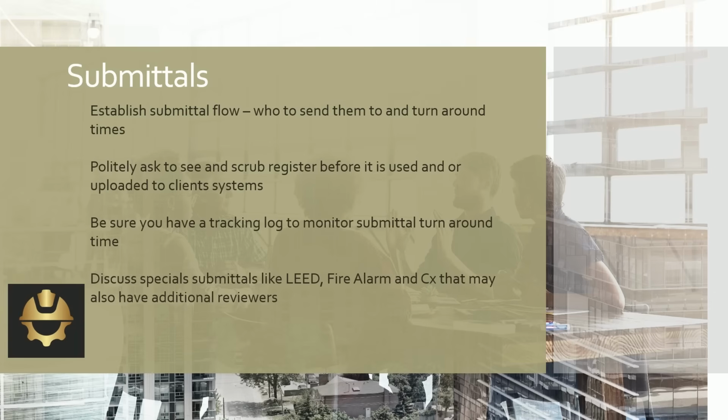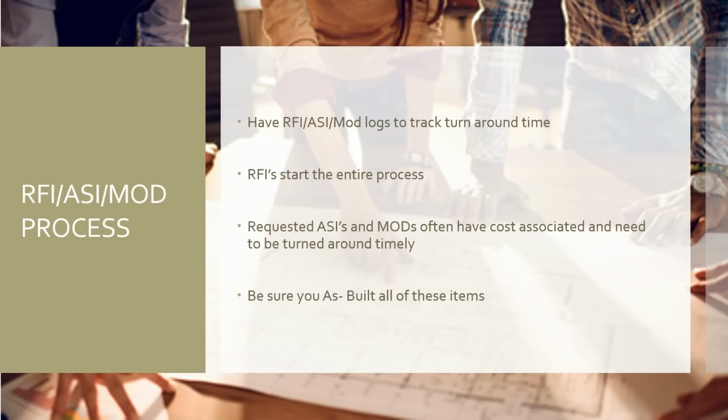Yeah, it won't work if you can't have it bought out. You've got to have that whole project bought out, and that again is usually out of the control of the QC manager. So it's only special cases where that will work, and we know it. But when you have one of those cases, it could really be a feather in your cap. So that's what we've got on submittals.